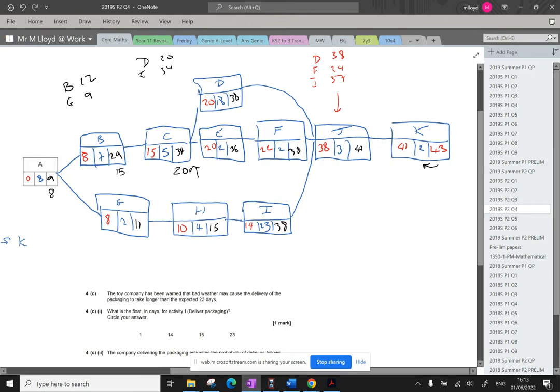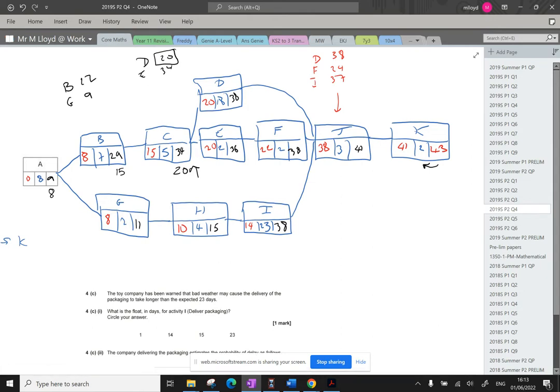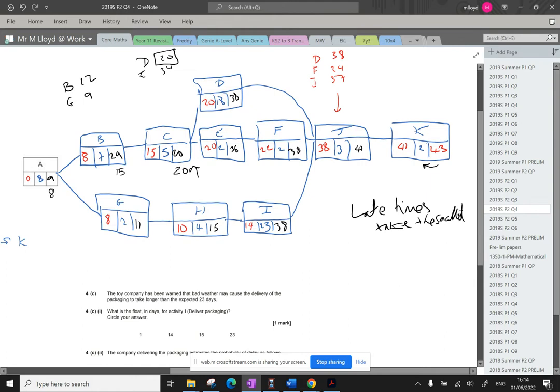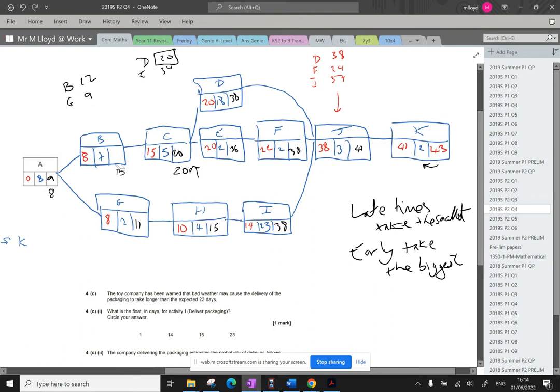So for this bit here, looking at D and E, it is the 20 that we need, because if we wait to day 34, it's going to push back the entire project. So we need to replace that. When we're doing the late times, I need to write this down. So the late times, you've got to take the smallest. Take the smallest. And for the early's, you take the biggest. Okay, so you've really got to practice, practice, practice these skills. So this one is going to be 15 in there.